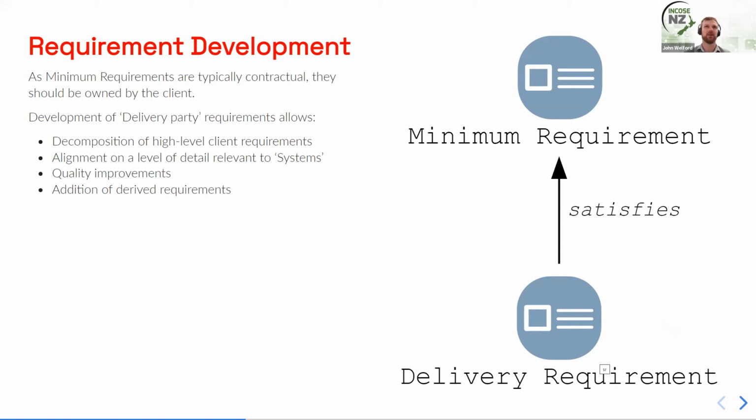And also on iReX, where we've got that similar link between the different terminals, we've also been trying to maintain that where we split the asset requirement between multiple packages. So that also assists us with that impact assessment to be able to say, oh, there are 2 or 3 other similar requirements to this that might be impacted by a change request. Does that answer your question? Yes.